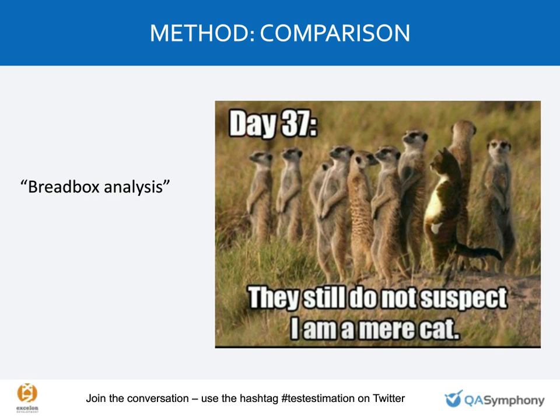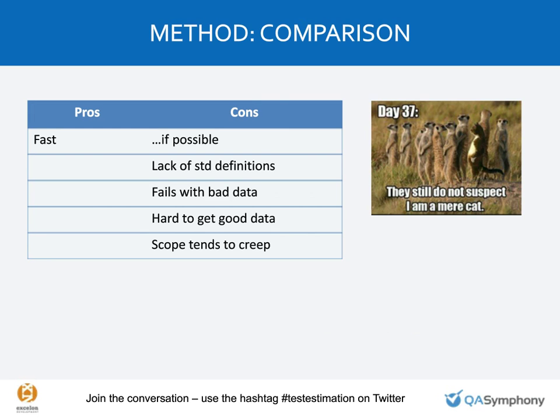So we have accurate data. And the technology doesn't change much. And the team doesn't change much. And the subject matter doesn't change much. This can be a very, very effective and cheap way of estimating. But the problem is when things change. So the picture is of a meerkat among meerkats. This is not the same thing, right? So it's fast. It can be pretty accurate.